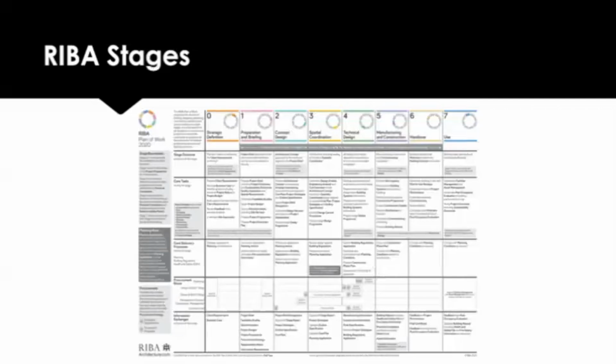So they would need to take the concept, fully design it, and then build it. Or we could go out at RIBA stage 4, where we've completely designed it ourselves and we just ask someone to come and build our designs. So there is a difference in terms of how you might appoint contractors.